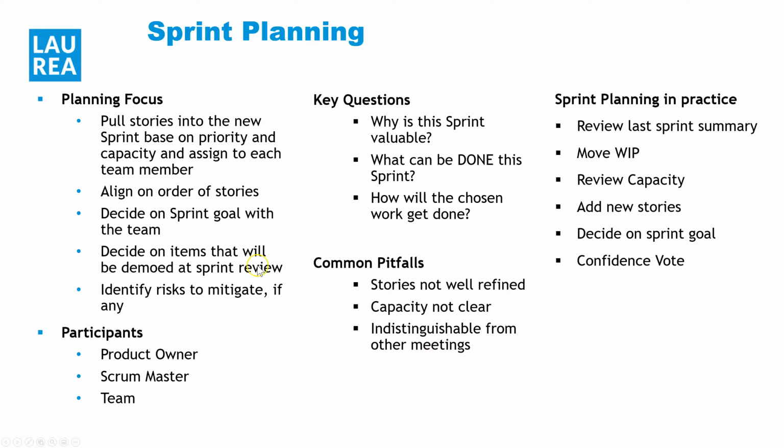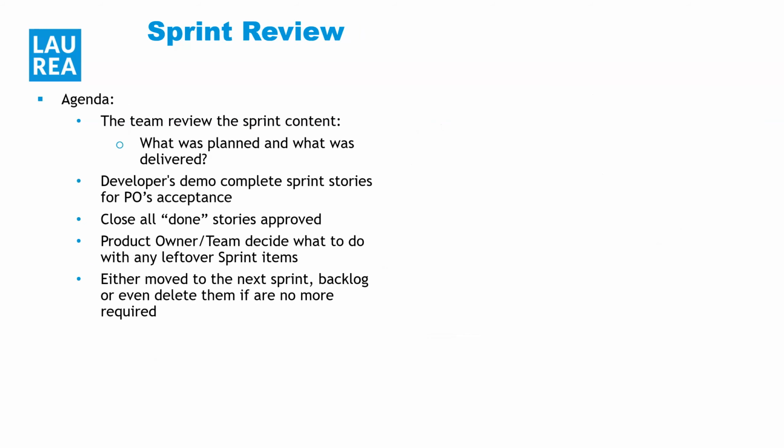So you need to make sure that you're focusing on this and not just do it the same way other meetings are run. And of course, at the end of the whole meeting, you can have a confidence vote, so the team will decide, okay, are they confident that they'll be able to complete the amount of work put in. And then the sprint review.